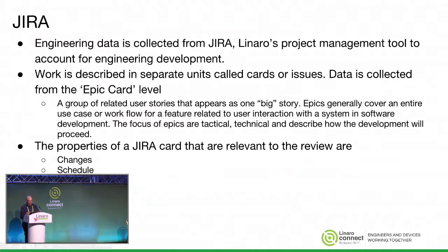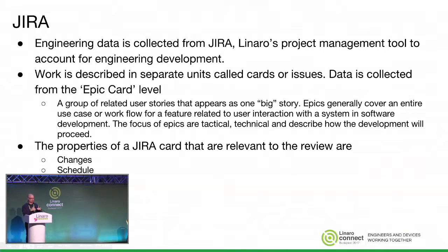A very quick primer on Jira: the individual work units are called cards or issues. We have a hierarchy that starts at the initiative level, which is strategic, and that feeds into an epic level — which is a Jira term — and then stories, which is again an agile term, and subtasks underneath.